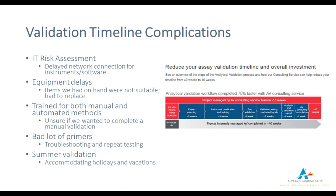We also weren't entirely sure whether to do all automated or manual testing for sequencing. Our initial thought was that if the instrument goes down, we need a manual method. When we told Thermo Fisher we wanted to train for both, they set us up with the training needed plus an additional list of supplies for the manual method. After training on both, we decided the automation worked much better — it fit our needs, reduced personnel time, kept costs down, and we ended up having more than one instrument. Having redundancy and a backup meant that if one instrument went down we still had a backup, which pretty much eliminated the need for a manual process and also reduces human error.